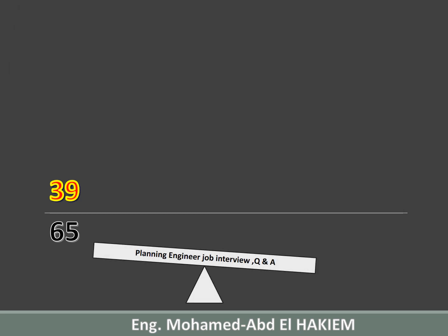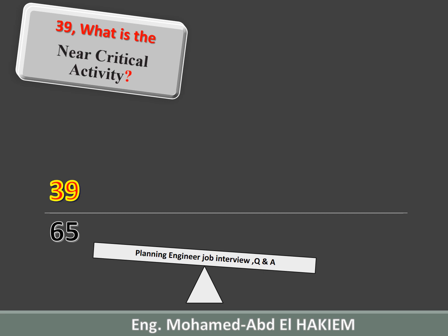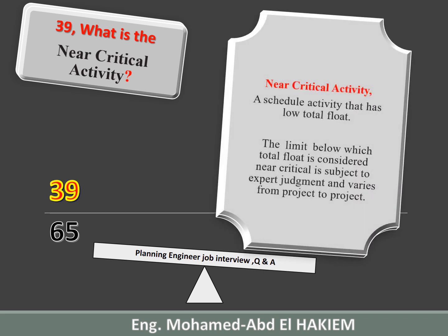39. What is the near-critical activity? Near-critical activity is a schedule activity that has low total float. The limit below which total float is considered near-critical is subject to expert judgment and varies from project to project.